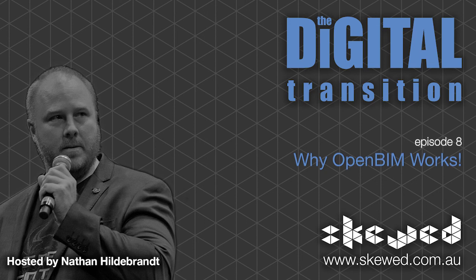It's just to exchange issues. I just mentioned Solibri, I think a lot of people heard about that software. In Solibri, you can do a class check or a rule-based model check. You need to communicate that, and instead of sending over a complete IFC, you're only sending over issues. You're only sending the information that's relevant, which is the most important thing, without sending additional digital information that's of no purpose to communicate a problem. So I think that's probably the key thing to note about BCF. Like I said, it's a demand-driven process, and you need to exchange only relevant information.